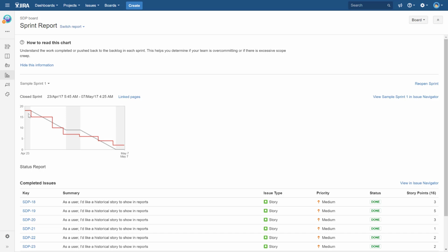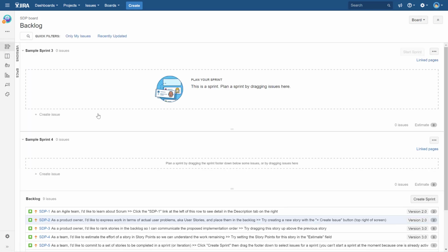That's why it's good to start with shorter sprint periods, like 5 or 10 days. I was working with another company that decided to do 30 days. The gray line was flat in the middle, during the middle of the sprint nothing was happening, and people rapidly started closing the issues toward the end of the sprint. Okay, I think that covers the reports in this video.